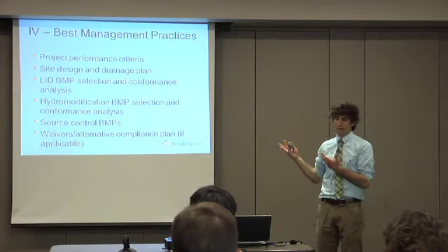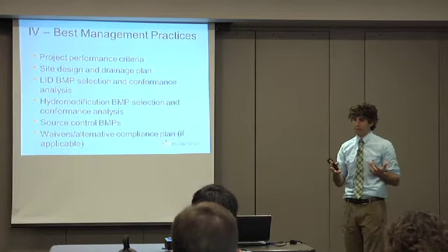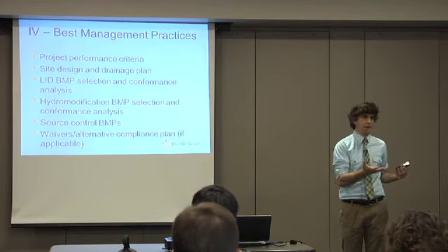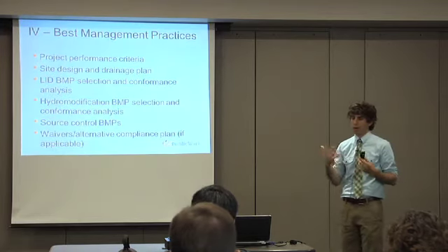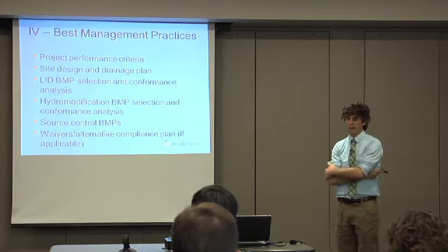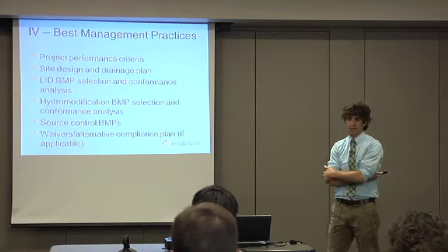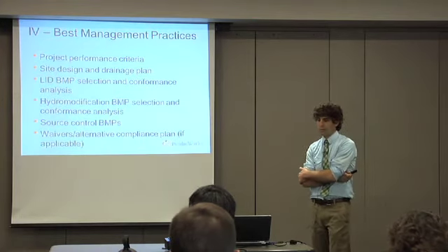On the other hand, if hydromod doesn't control, someone could simply do some sizing worksheets, identify the LID BMP that they've picked and why it's right for the site given the feasibility conditions, and demonstrate that the size that they've provided is greater than or equal to the size that's required for the LID requirements.